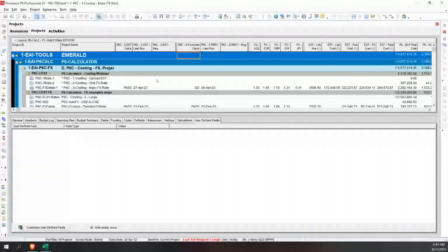You need some ability to manually forecast. So that's what I'm going to show you. And if you're in a capital project, you definitely want to be driving towards updating every single week. And if you can get automation between your tools, you can do it even more often. That's what you're driving for.